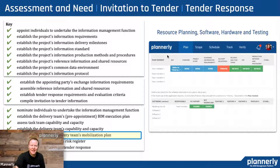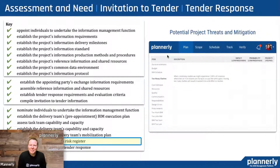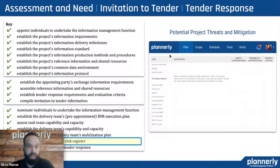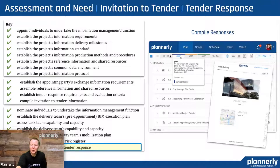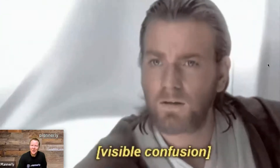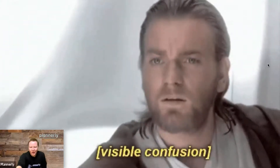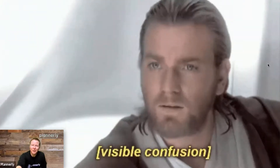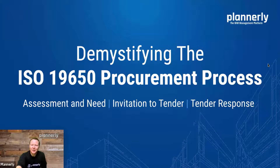And then the last two to run through quickly: what happens when the proverbial hits the fan? Make sure that we are prepared for most of the cases that can go wrong, using what we learned on other projects, and have a plan to get around issues we might run into. Assign those mitigation measures to specific parties so that they are followed up on. Then be able to compile the responses — one of the challenges is having all of these different documents. We've covered around 20-odd points, and there is a lot that needs to go into all of these plans. That is why we have templates, so that it makes it a lot easier — completing the templates makes it much easier for teams following the workflow that aren't necessarily ISO 19650 experts.